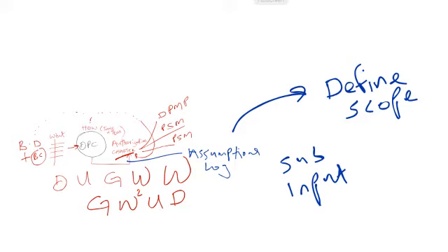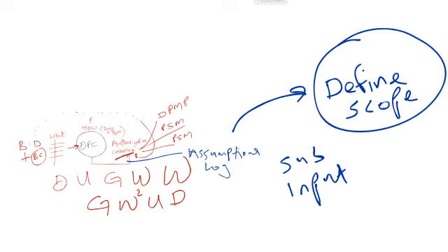So it's where you are checking your assumptions log. And guess what? If there are updates to those assumptions as an output of this process, define scope, you're going to get updates to the assumptions log in project documents updates. You're going to see your assumptions log needs to be updated.